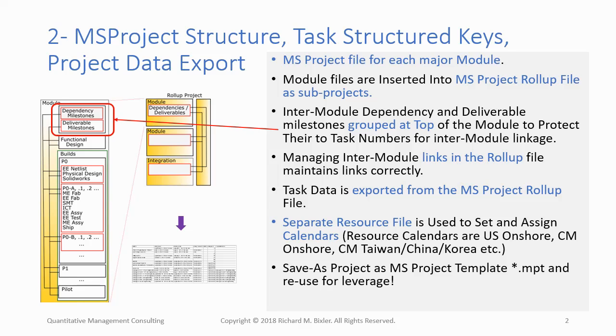MS Project task predecessor and successor tasks are indicated with MS Project using its file name concatenated with its task number, which is pretty much a line number in the MPP file and changes as tasks above it in the MPP are added or deleted.